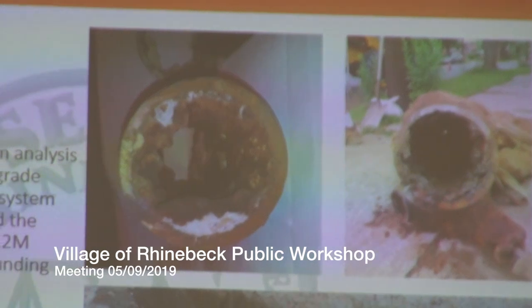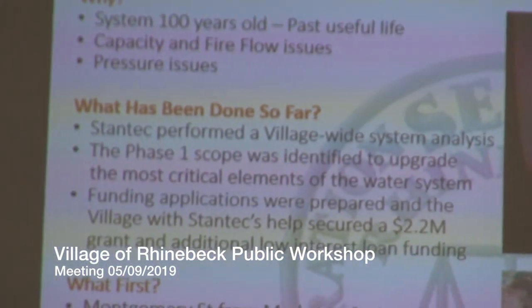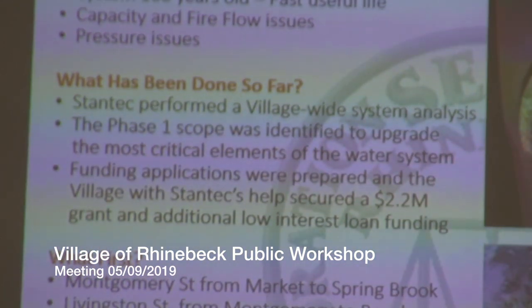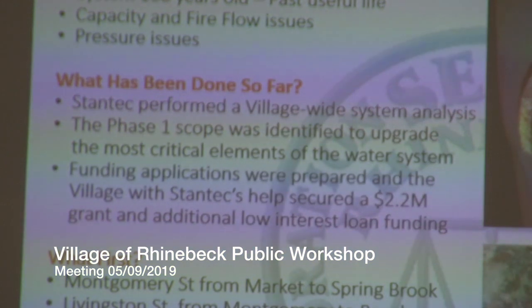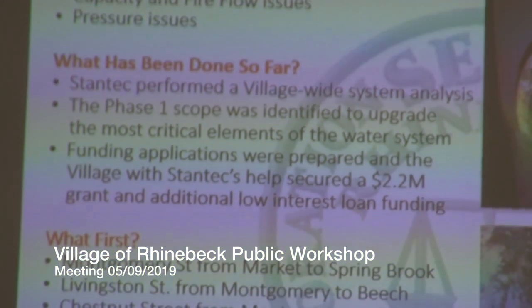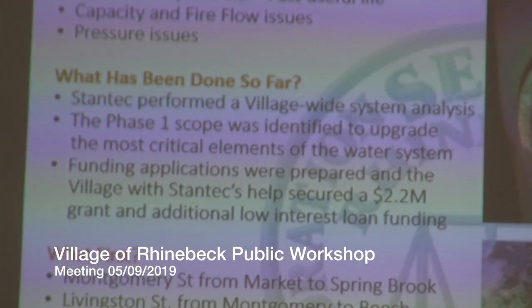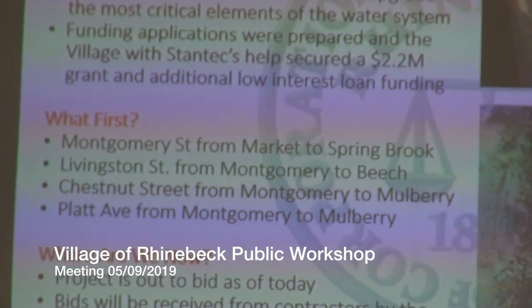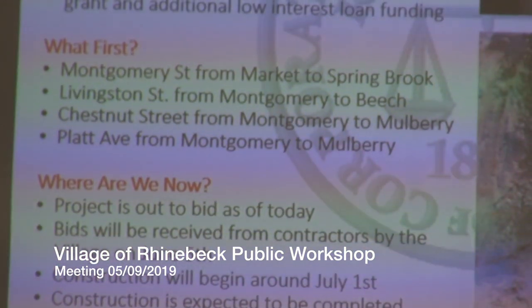What's been done so far, as I mentioned, Stantec performed a village-wide system analysis, and then we identified the phase one component, which were the most critical components of the water system to replace. Next, over the last 2 years, we worked with the village to obtain funding through the state, and we were successful the beginning of this year securing a $2.2 million grant, as well as additional low interest loan funding. I just went through the streets that we have proposed as part of this project.